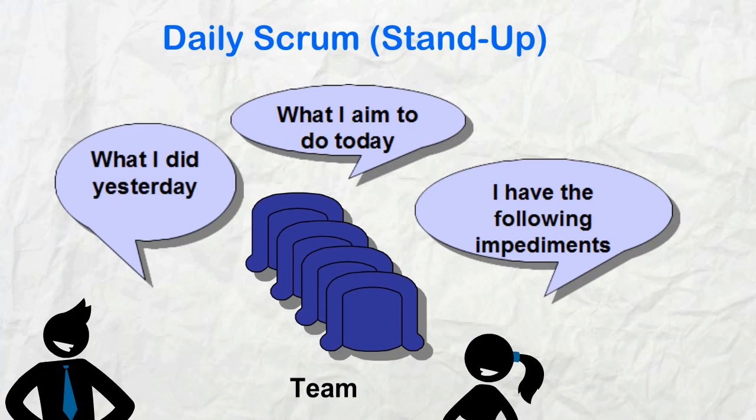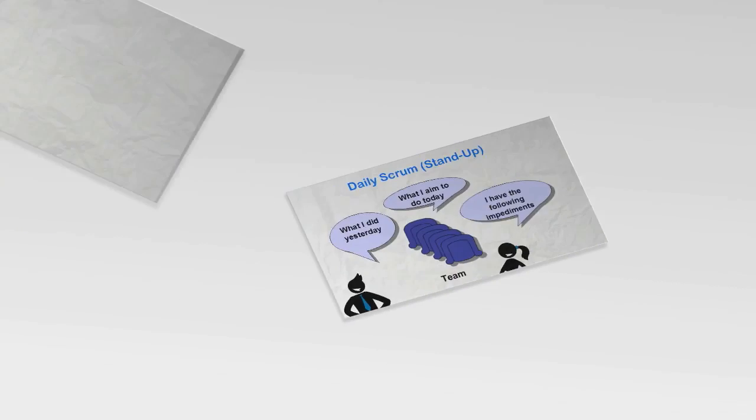Anyone else at the daily Scrum remains silent so that the meeting can be as productive as possible for the team. Any issues can be discussed afterwards. The sprint backlog and the sprint burn down should be visible to draw attention to the team's progress or any impediments. See definitions in this chapter.